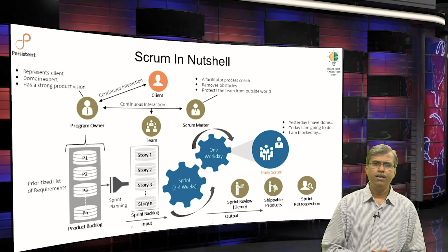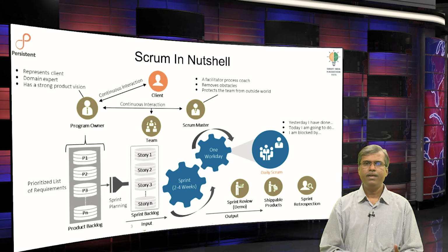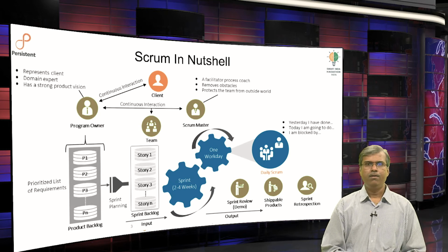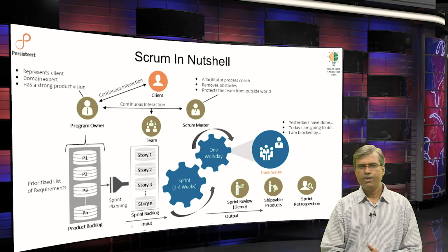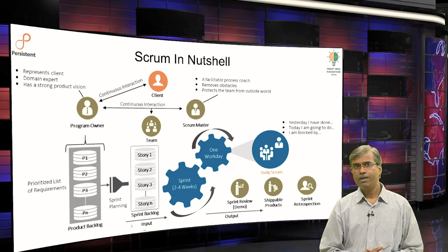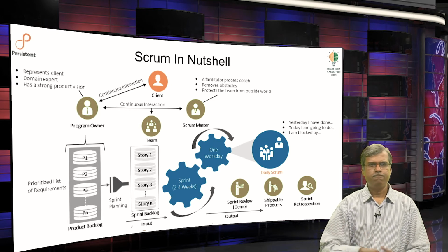It is possible to actually develop and deliver stories at an increment faster than probably 2 weeks or 1 week or even every day. However, it requires a lot of technological backbone establishment, so that you have the appropriate amount of control on the quality of the software, the testing that goes in, the security checks that you apply, and so on and so forth, so that you can deliver in time whenever a particular feature is ready. It is not impossible, but at a project level probably 2 weeks makes more sense.